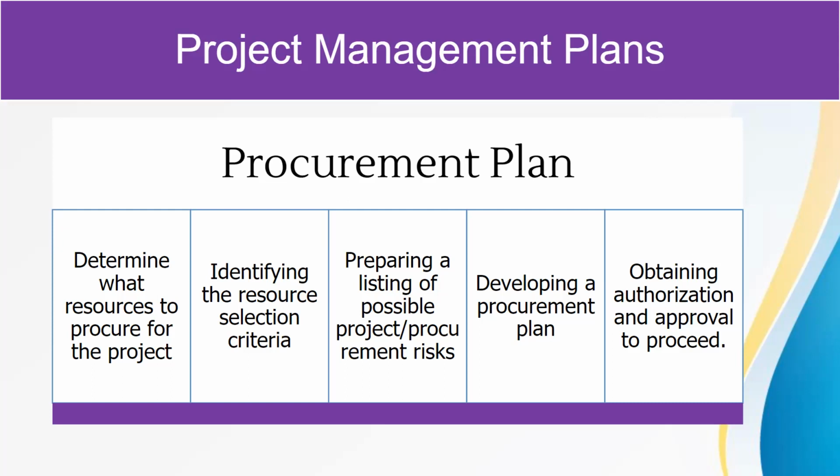You also need to look at how it is going to be authorized. Remember, the organization should have a clear and established structure on how procurement can be authorized. For us to go and procure, it can't just happen like that. We can't just take money and go procure. There must be a process for authorization or approval. So how is it going to be done? Who is going to affix signatures? Who are the signatories to approve a particular purchase?